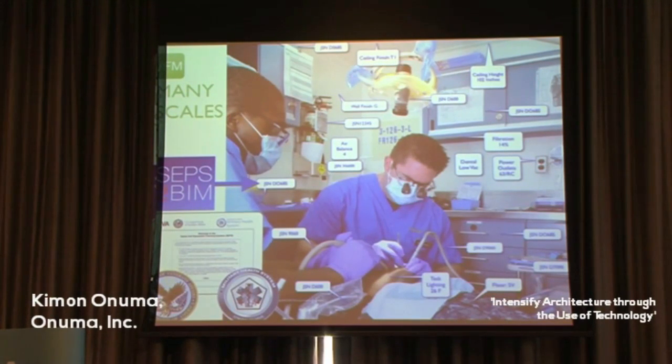So if you look at an exam room like this, everything around it, the type of equipment, the size of the room, the floor finish, the number of air changes, this is all data that drives into the requirements of a facility. And they've had a system for years called the Space and Equipment Planning System, SEPS, that was behind a firewall. You had to be a government-approved person to jump in there to even look at what are the standards for a healthcare room. And then you output it as a PDF file and handed the stack of PDFs to the architectural teams and said, here's a 1 million square foot hospital with 2.5 million data points. That's your contract to deliver it back to us as a hospital.